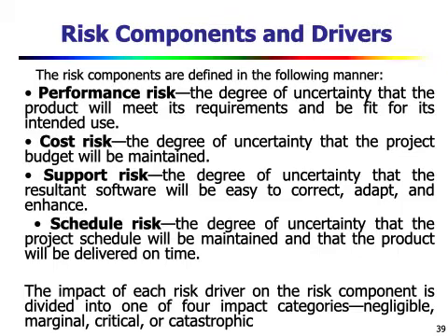Performance risk is the degree of uncertainty that the product will meet its requirements and be fit for its intended use. Cost risk is the degree of uncertainty that the project's budget will be maintained. Support risk is the degree of uncertainty that the resultant software will be easy to correct, adapt, and enhance. Schedule risk is the degree of uncertainty that the project schedule will be maintained and that the product will be delivered on time.